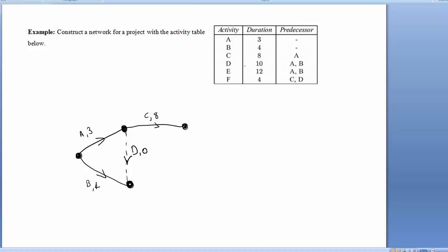Okay, now I'm going to make task D. So let's run task D out of here, and that goes for 10. Now what we can see, if we look back to what is immediately before this edge here, we've got D and B, but D is of task 0. We trace that back, we go all the way back to A. So what I can say is the predecessors are definitely A and B for task D, so this definitely meets the requirements of this particular task.